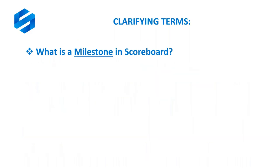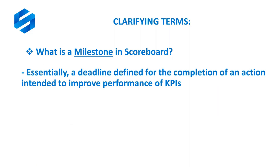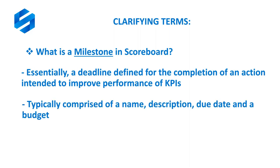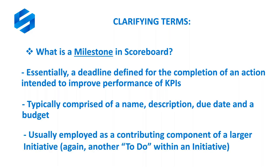I often refer to tasks as the to-do's that live within an initiative and support or feed progress toward the overarching initiative. The last term is a milestone — essentially a deadline or due date defined for the completion of an action intended to improve KPI performance. A milestone is typically comprised of a name, description, and just a due date — no start date. It can also have its own budget, and like tasks, milestones are typically contributing components of a larger initiative.